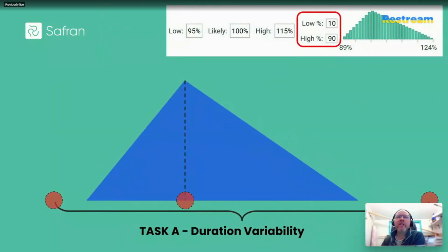Because if you're in the early feasibility stages or you don't have a mature risk register yet, then frankly, you should be considering the more volatile shapes, the uniform, the trigen distribution perhaps. And these help you to reflect the confidence that you and the modeler have in the project's own assessment of the uncertainty at hand. And it's a good way of managing expectations, combating bias, and it gives you some wiggle room to redefine or refine your model as the project matures and fresh understanding of your scope, constraints, and other influences are learned and more credible plans begin to get formed.